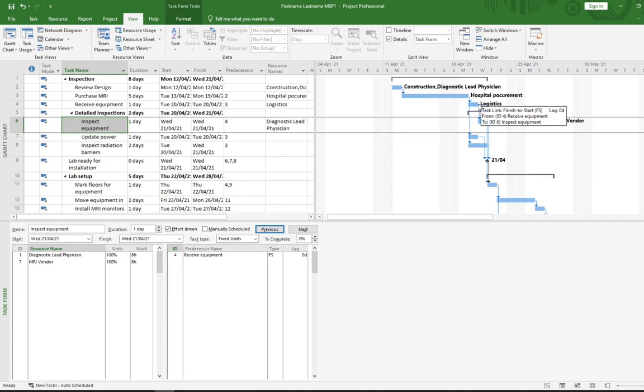You can use the drop-down menus here, or you can use a task form. It depends on what information you want to input. With this you can input a bit more customizable resources, or you can use the drop-down menu. We'll be using a bit of both later on. Project assigns both these resources at 100%, and we can also see the work hours, which are set to 8 hours as well. So you'll see 8 hours here and units are 100%. That's just the default units, and we can adjust them if we need to.